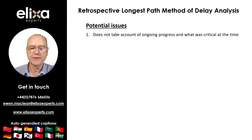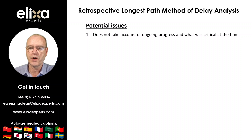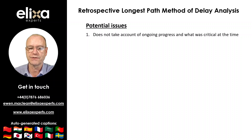As demonstrated in my first video, I highlighted that the retrospective longest path method of delay analysis might prove unreliable in dispute resolution because the method does not take account of ongoing progress and what was critical at the time. Instead, it stands at the end of the project looking back to ascertain what the longest path through the as-built program was. This can mean critical activities at the time are ignored and that critical delays are incorrectly allocated to non-critical activities of work.